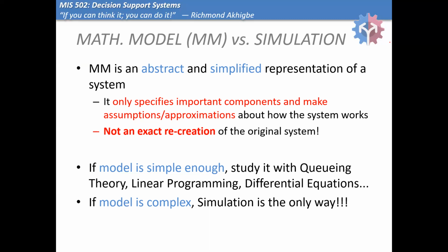The point I'm trying to make here is, when you deal with CPM, you're assuming that an activity is taking 5 days. This activity is taking 7 days. Now, what you are implicitly doing is making an assumption. It will be finished in 5 days. It will be finished in 7 days. Now, it's an assumption. It may not be happening exactly like that. It may take 5.5 days. It may take like 4.8 days, right? Do you understand what I'm trying to say? The assumption thing that I'm trying to tell you.